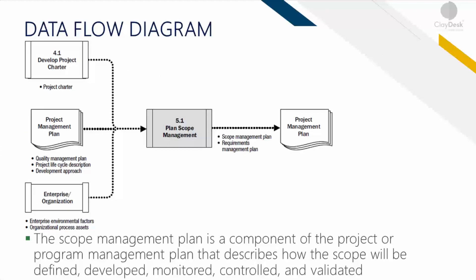Here's a quick data flow diagram. Once again, you have the project charter coming from the previous chapter, which becomes part of the project plan for the organization. Scope management is created and you end up with the scope management plan, which details the requirements management plan — a component of the project or program management that describes how the scope will be defined, monitored, developed, controlled, or validated.